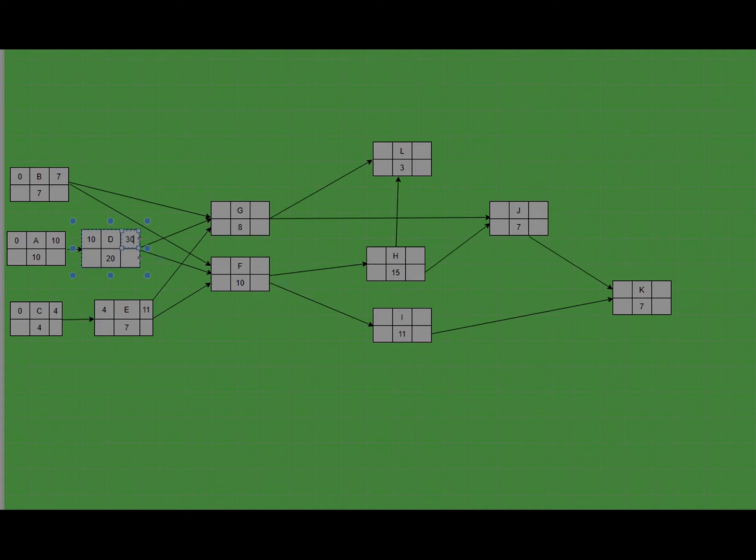For task F, it depends on three tasks: task E, task D, and task B. We find the maximum of these three, because task F can only start when all three tasks are completed. So the early start will be 30 and early finish will be 40. For task G, it also depends on task B, task D, and task E, so we find the maximum of these three. Task G can only start when all three tasks are completed, so it is also 30, and the early finish is 37.